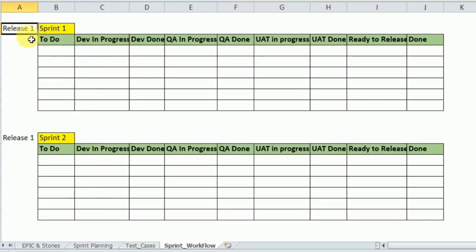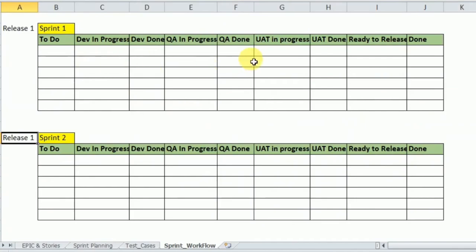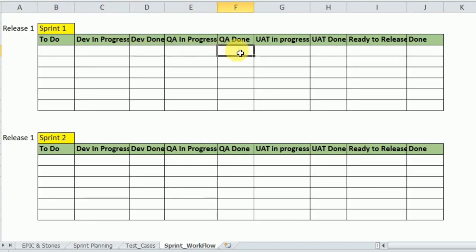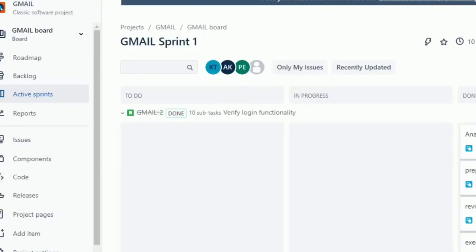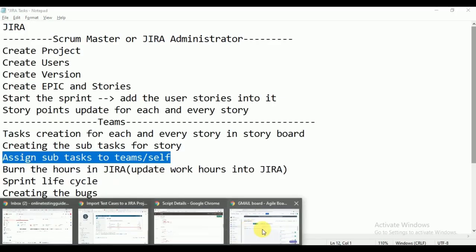In real time, companies have columns like: To Do, Dev In-Progress, Dev Done, QA In-Progress, QA Done, UAT In-Progress, UAT Done, Ready to Release, and Done. For example, Sprint 1 and Sprint 2 together cover Release 1 — all stories in those sprints need to be completed. When ready to release, you give the sprint demo to the product owner and stakeholders. If everything is okay, the story moves to done — the sprint lifecycle is complete.